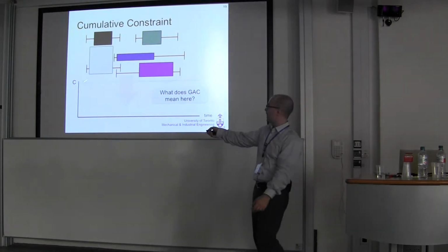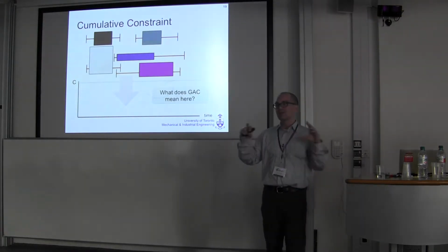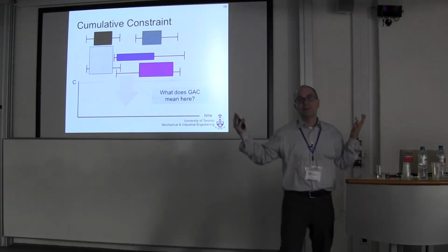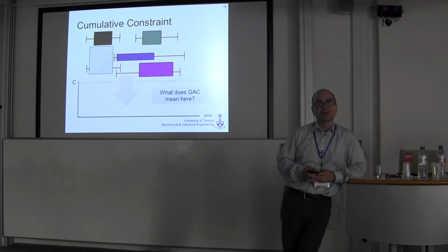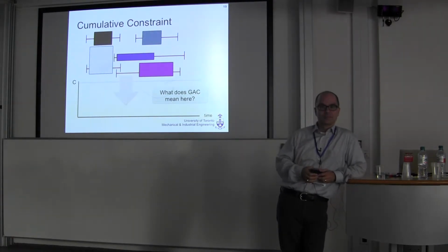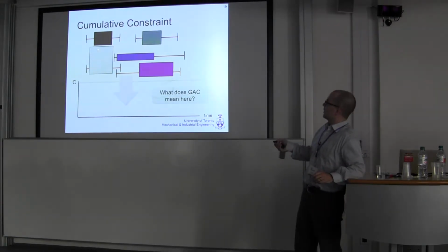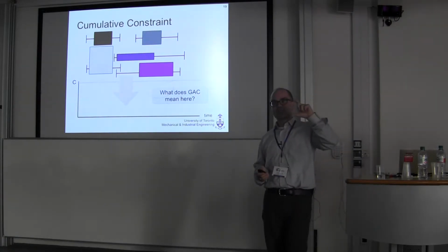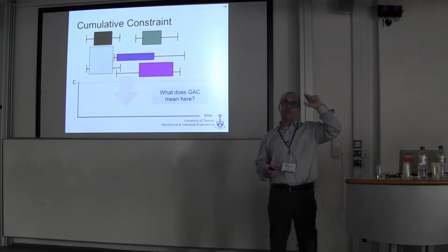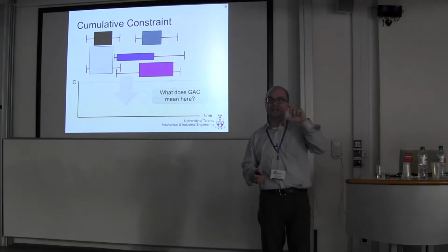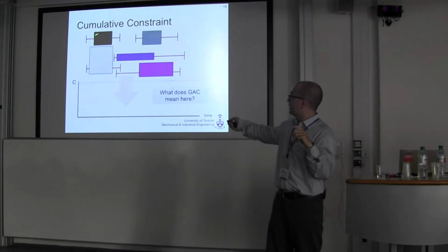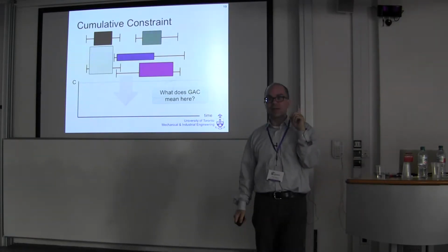What if C equals 1? So rather than having a cumulative constraint, we have what's called a disjunctive constraint. If C equals 1, what would be another variable that we could use to represent this problem, or a piece of this problem? The consumption of the resources. So it's certainly the case that sometimes these activities don't have a fixed amount of resource. Sometimes they could consume more or less. But we're going to assume now that each activity has a fixed amount of resource. And if C is equal to 1, then each of these activities requires only 1 unit of that resource.